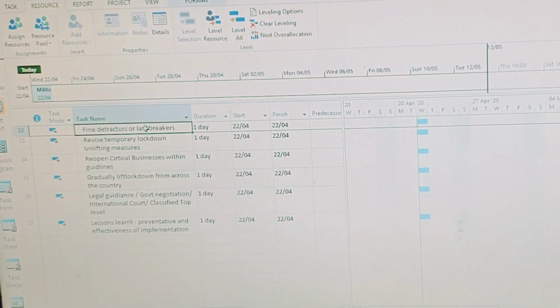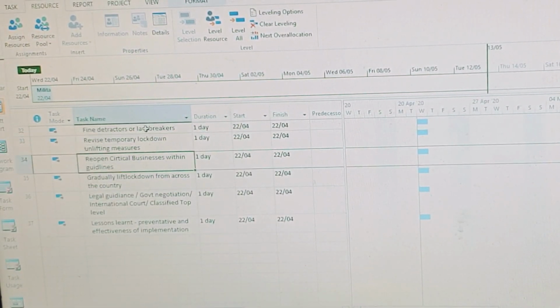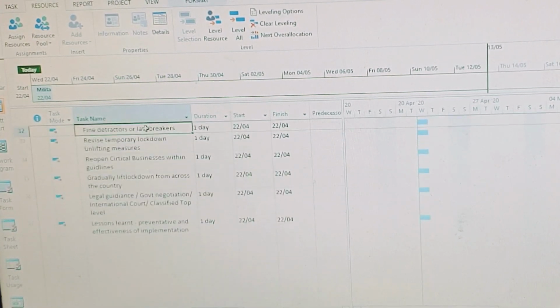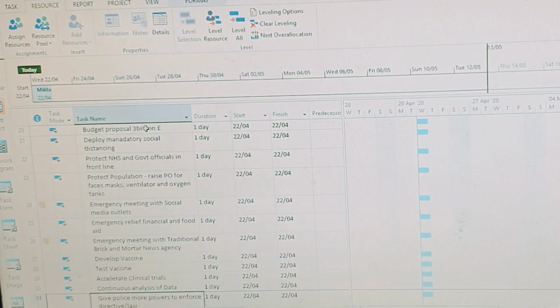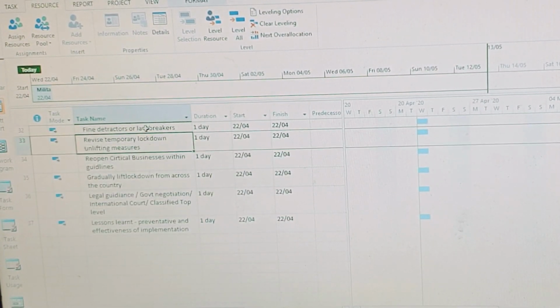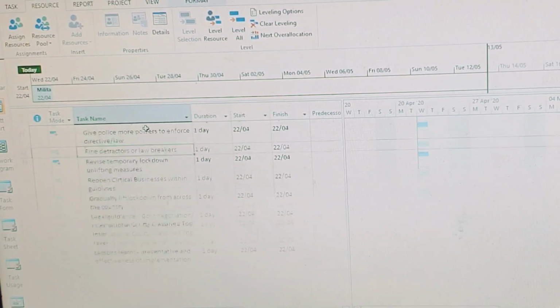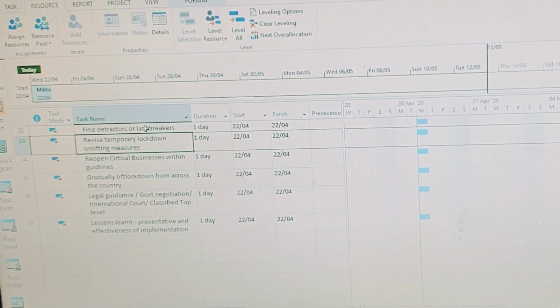Due to time constraints, I can't cover everything, but item 37 is your last task, and if that's a milestone, in the predecessor column for item 37 you can affix the number 36, and put 0 days in the duration, and that will set your milestone.